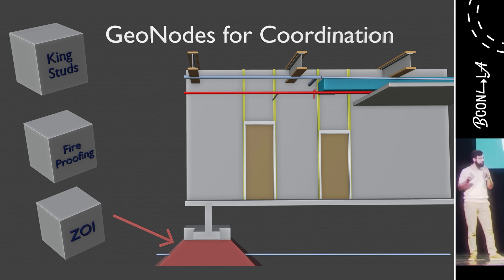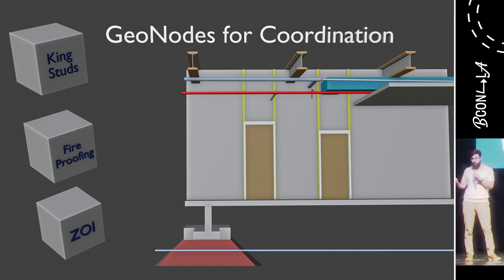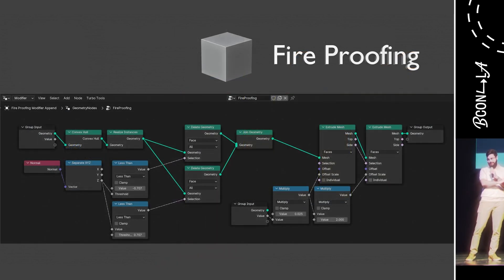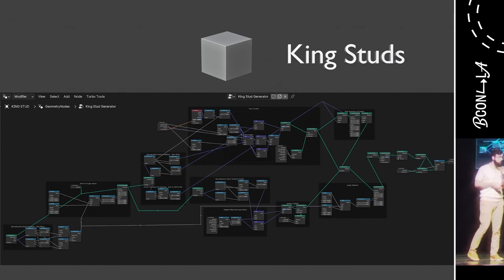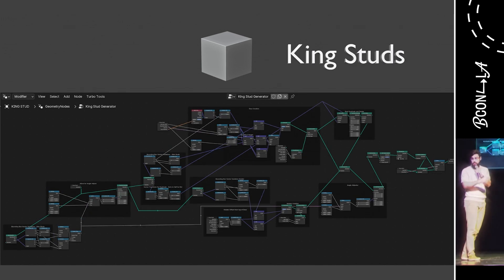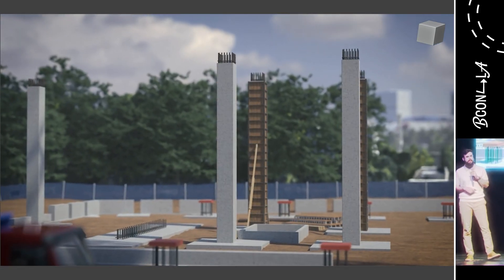On the face of it, this looks like a fine design and routing for the system shown — until we start adding in detail for constructability review. We can add king studs to our doors, which are required to run from the frame all the way up to the deck. We can add fireproofing to our beams, which is spray-applied after the beams go in but before the MEP systems. And we can add zones of influence to our foundations, which represent the extreme pressures underneath our buildings. Once we add this detail, we immediately see that our design might need to be reworked. These are just a few examples of easy geometry node setups we can leverage on our projects.